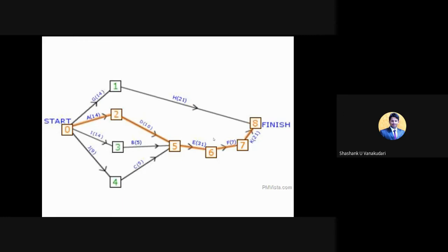we need to concentrate much on these activities compared to other paths' activities. Somehow the first path, which is going to take around 35 days, while the total duration is 83 days, you can complete this path, that is 0 to 1 and 1 to 8. The total duration of this project is around 83 days, which is by the second path. So you will have certain time for the first path, third path, and fourth path.